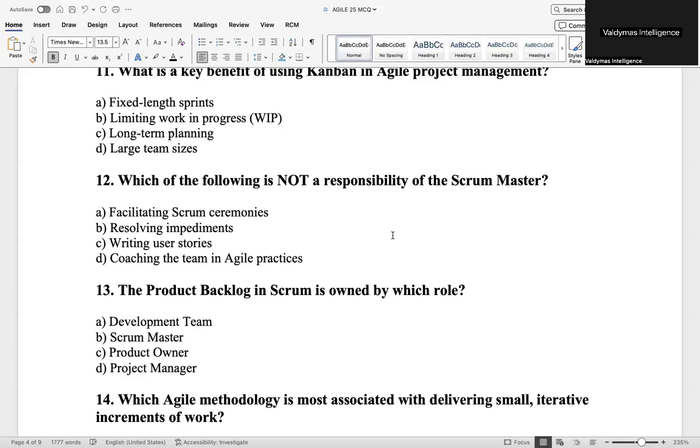So my first user story is that, okay, as a manager, I need data cleanup to ensure that the ingested data is accurate and has all the data elements for my program to be able to run the code. So that's one. Every user story must tell you who is involved, what you want to do, and why you want to do it. So listen to my statement again.